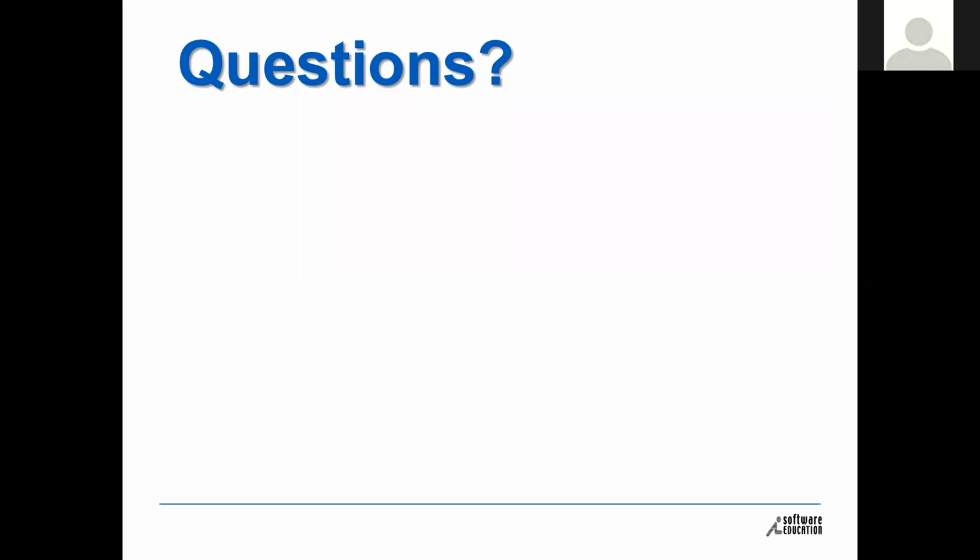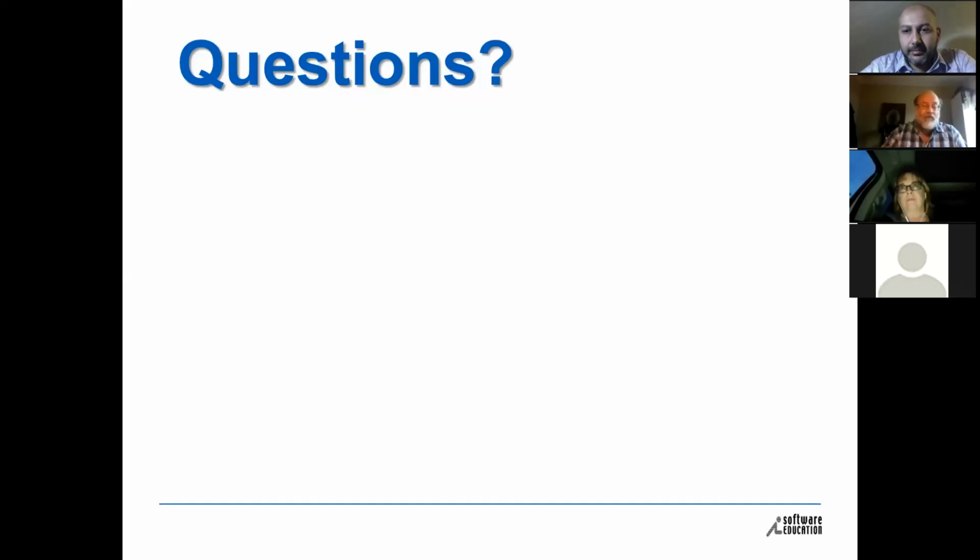It is a tough one, and it's one I've been doing some research in. One of the things that I've been seeing works really, really well is a lot of the innovation game stuff. What Luke Hohmann's been doing, games like Buy a Feature, I've used it a couple of times with projects now, with stakeholders, and it does help us to articulate the value. And value becomes a proportion of the whole, and we allocate that proportion to the story. So it's akin to story points, but it's not the same.